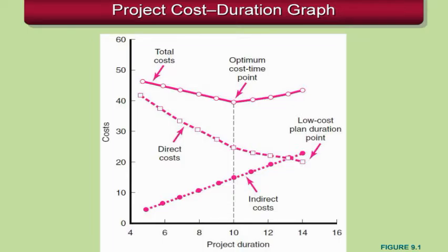When we collect this data, we can plot our indirect costs, and that's the upward sloping bottom line. Those are on a cost per day basis, a very linear, incremental thing. It's our project overhead cost, if you will. Then our direct costs, as we start reducing the time of certain activities, wind up going up. If you think about the project duration moving backwards, you can see a rise in direct cost as a result of putting additional resources on particular activities.